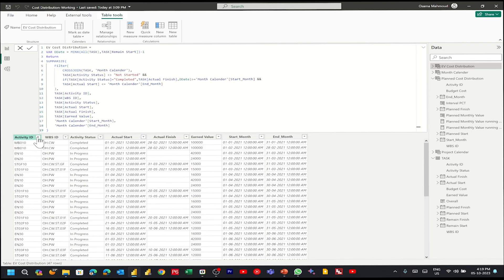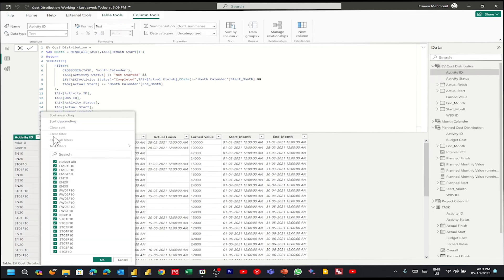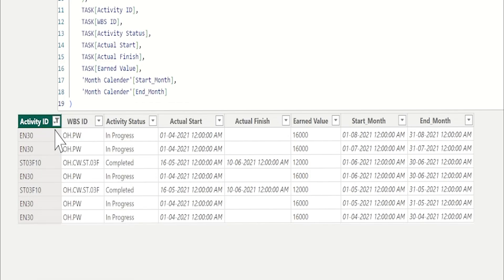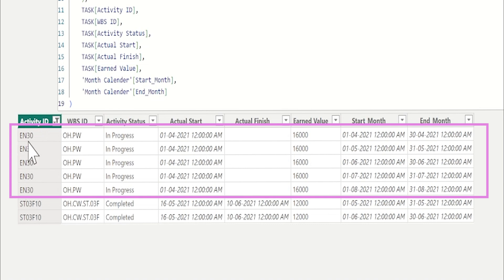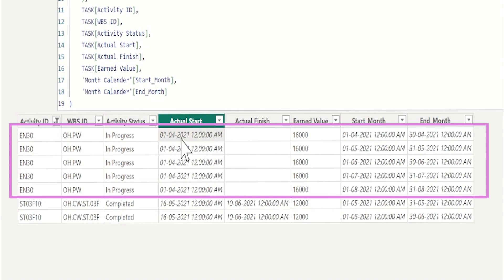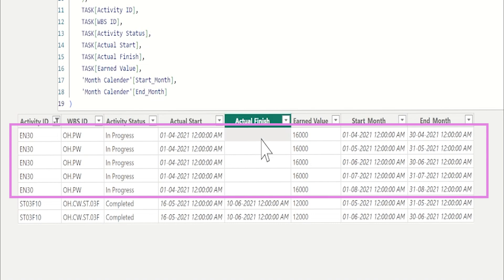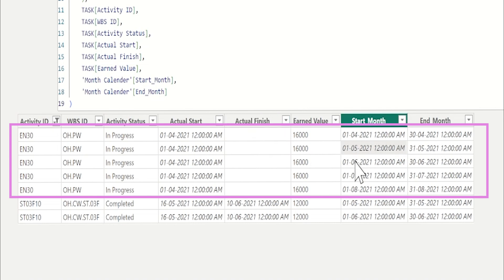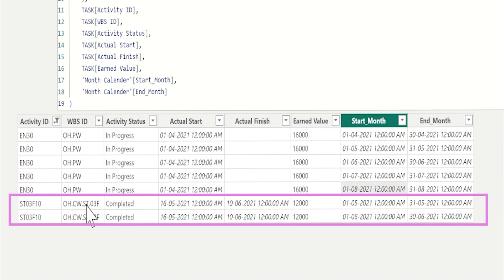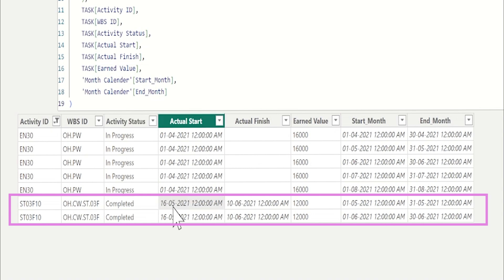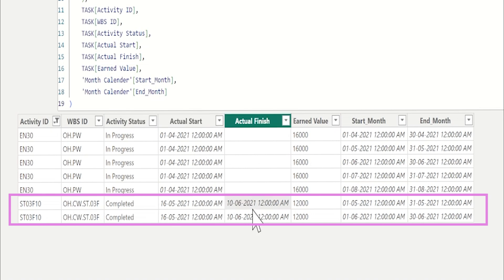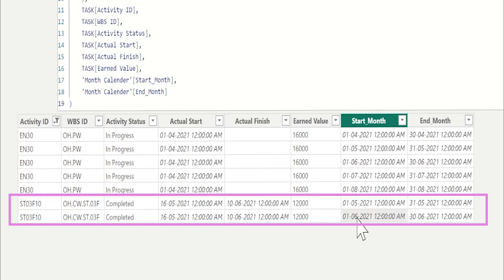Let me filter two activities to verify it's applied correctly: EN30 and ST03F10. I'll sort by activity ID. EN03 is in progress with actual start 1st of April and no finish date, so fn will be data date end of August — giving intervals April, May, June, July, August. The other activity is completed, starting 16th of May up to 10th of June, so the intervals will be May and June. Perfect.